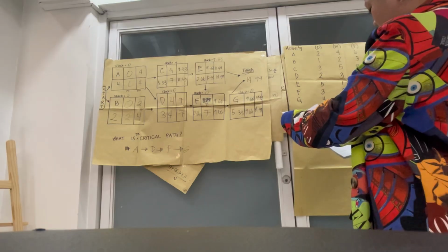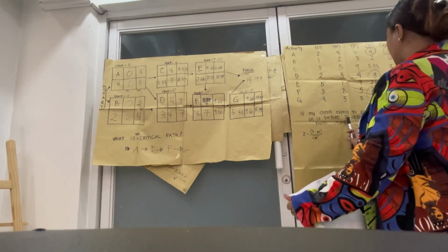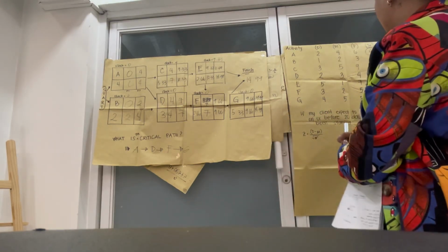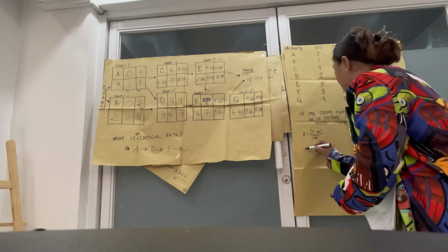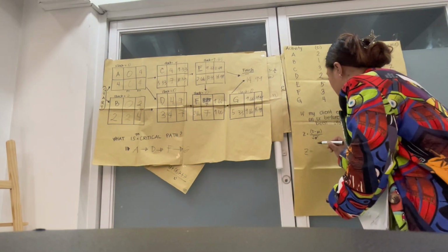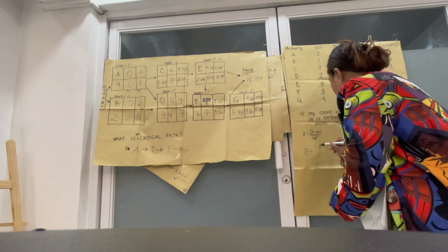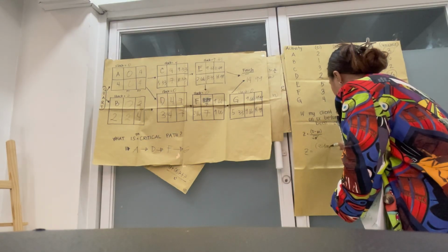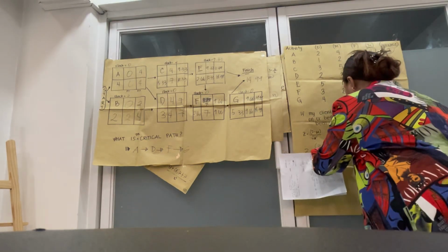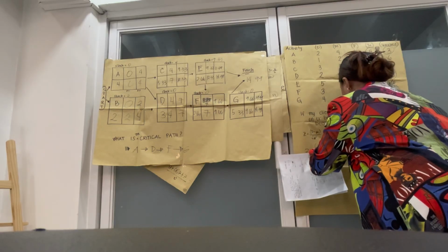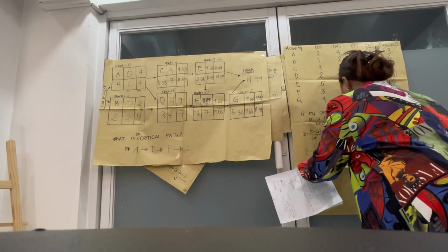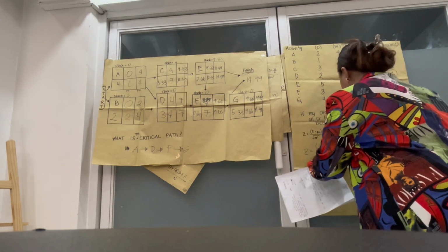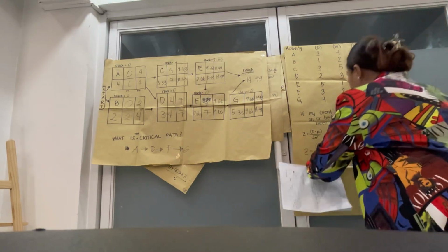So the D is the 20 days project. So Z equals 20 days minus 14.29, divided by the square root of 18.